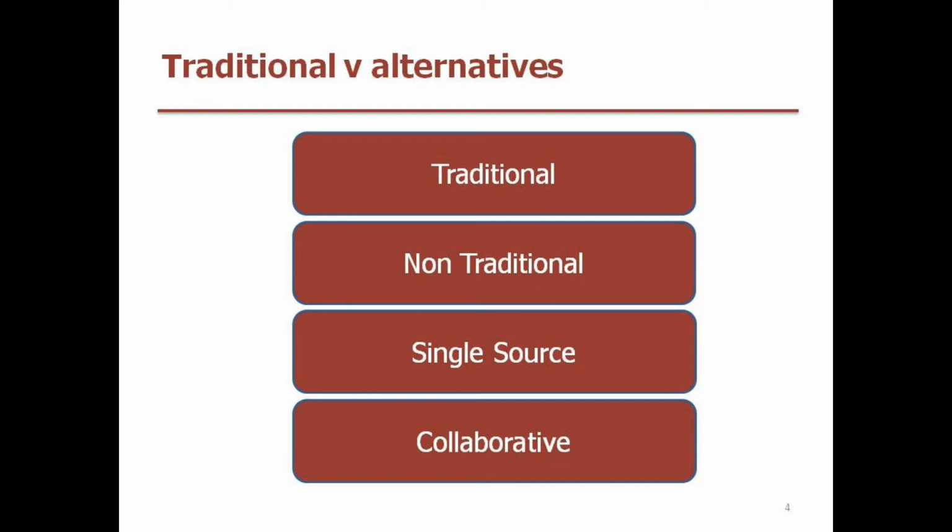If we consider traditional versus the alternatives, there are a number of different reasons why you might consider an alternative range of building delivery. Often it's issues such as the length of time from inception through to completion, trying to negate projects overrunning their contract periods, final costs being higher than expected, quality control always being an issue, the mismatch between design and construction, getting the legal line of responsibility clear, litigation on any procurement advice that may be given, and the risk borne by the client.